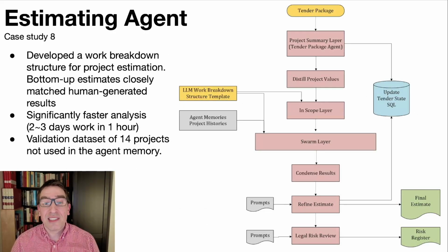So the last slide is sort of at the top of this side. We build our estimates up much like a human estimator would, and that's with a work breakdown structure. We use those work breakdown structure items to build up that estimate item by item. We have a very good idea of what's in, semantically, the tender docs and what's in the project, and it's just a matter of then making sure it's in scope.